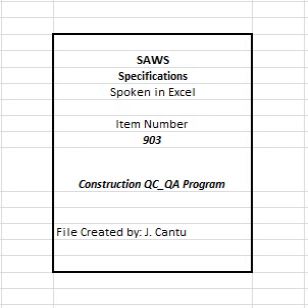6. Coordination meetings. These meetings are scheduled and conducted by SAWS. They will be scheduled as required and/or prior to the start of a definable feature of work on the project. The primary purpose of these meetings is to establish a positive working relationship and to achieve a mutual agreement with the contractor on the QC plan and safety plan requirements. The coordination meetings should address the following.